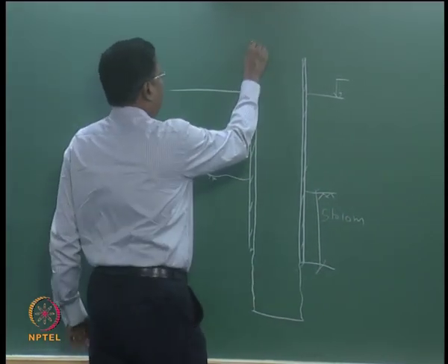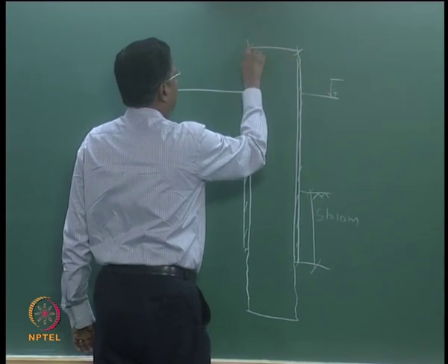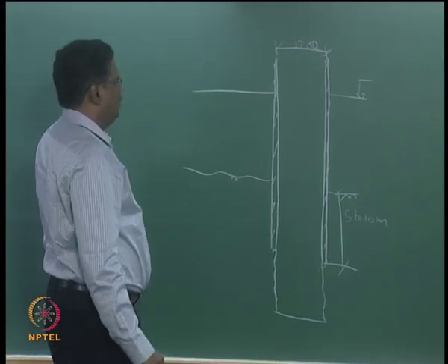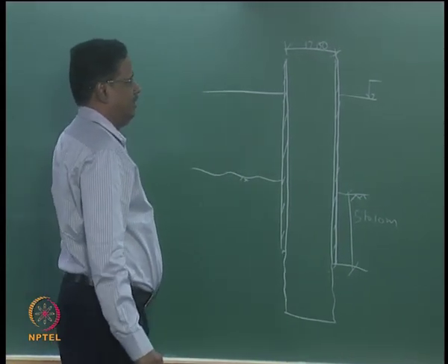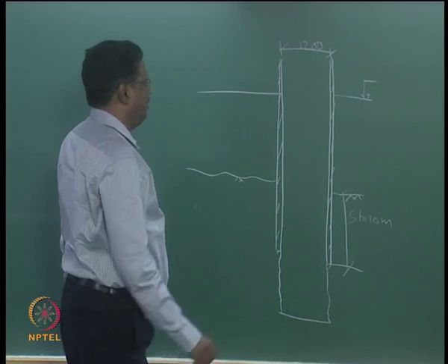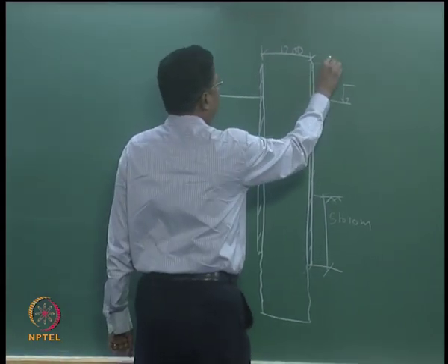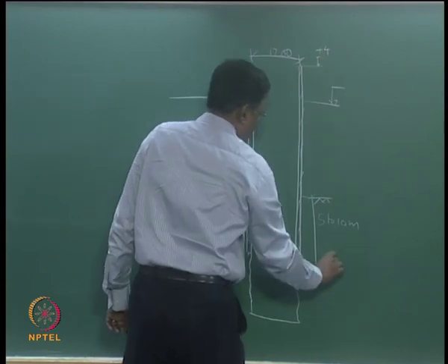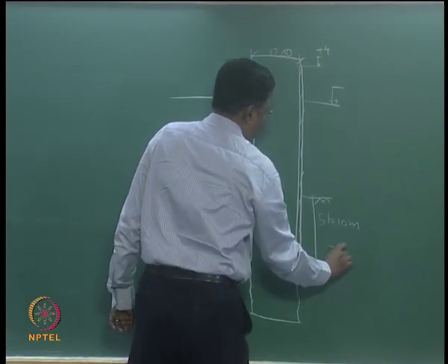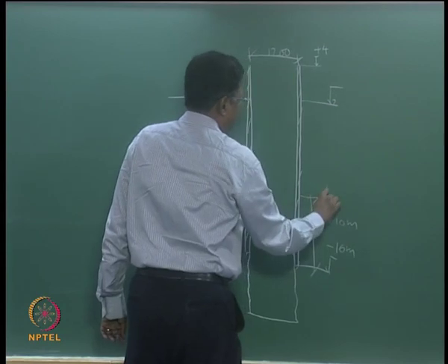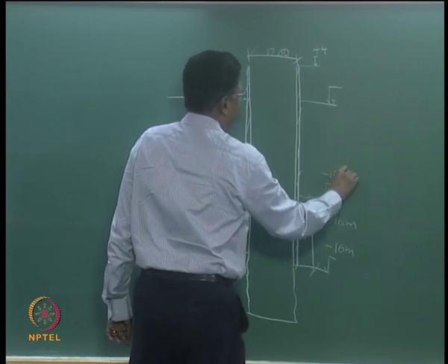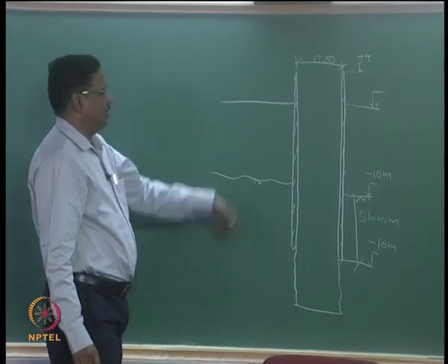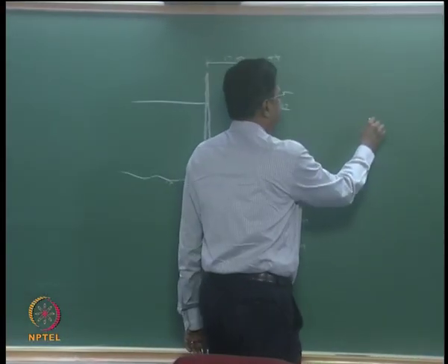Suppose the diameter of the pile is about 1200 millimeter. The item is liner weight per ton. Suppose let us say the top level of the liner is about plus 4 meters, the bottom level of the liner is about minus 16 meters, bed level is about minus 10 meter. Let us say for example that this is the data we are getting. The length of the liner is about 20 meters,